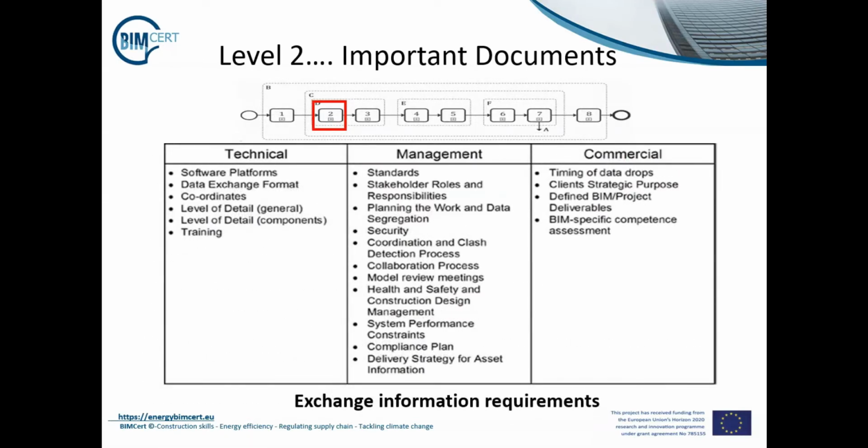Here are some of the items that might be discussed in an EIR. They include what software platforms to use, the data exchange formats, the coordinates, the level of detail, and what training is required. Also, what standards should be used, stakeholders' roles and what their responsibilities are, planning the work and data segregation, security, such as PAS 1192-5,